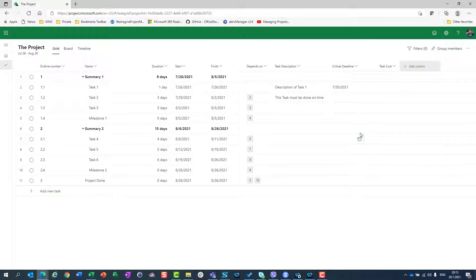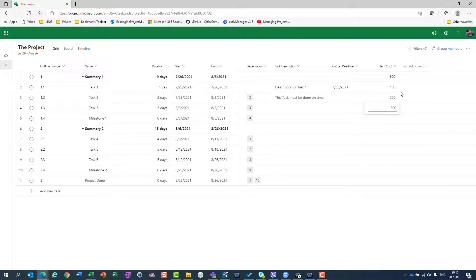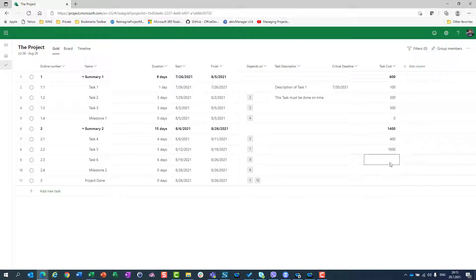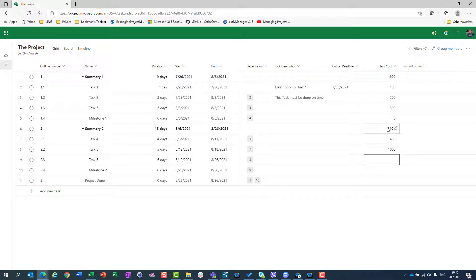When I go to Task Cost, I will enter values: 100, 200, 300, 0, 400, 1000. You will see that since I chose sum, I will have here the sum of all those Task Cost values.